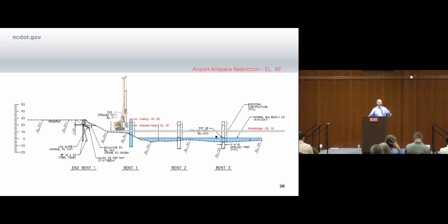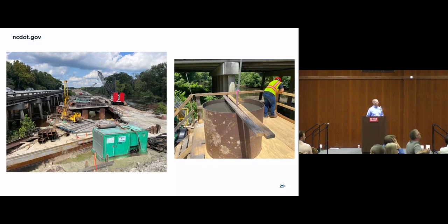And generally, the artesians that I've been involved in are not this bad, this impactful, but this goes to show you that it can be. So this is just kind of a quick view here of the work bridge. And again, you can see all those fingers. So it's a lot of effort because we did talk about modifying the work bridge. Can we raise it? Can we do some different things with it? But there's a lot of cost and engineering that goes into that work bridge. And so they've based that on the plans. And I guess I forgot to tell you, the plans did not include artesian conditions. So I guess that was a key point that I'm assuming that you took without me saying it. But we did not show anything artesian to be expected.